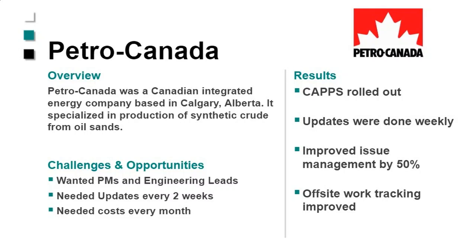One key thing that came out of this was the work that they weren't executing themselves. So the work that was being done off-site, like fabrication shops and what have you. So they were able to track those much, much better by deploying this out to those shops or to those off-site areas. And this allowed them to see where there were some busts in coordination and knowing where they were on delivery, which is really key to some of these big projects. Sometimes you don't know what's going on outside of your little area, and then it hits you all of a sudden, and it's affected your project in a huge amount of time or cost.